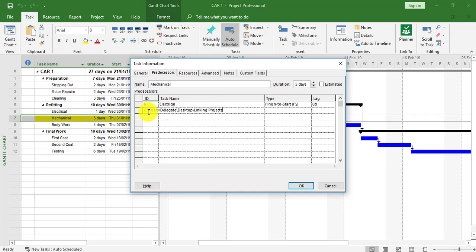Now I've got to tell this link to actually go to Car 3. I'm going to do a forward slash, then write in Car 3 the way it was saved as Car space 3, another forward slash. Before the forward slash I'm going to get rid of that backspace. You've also got to tell it the file extension, so I'm going to go dot MPP, that's Microsoft Project.